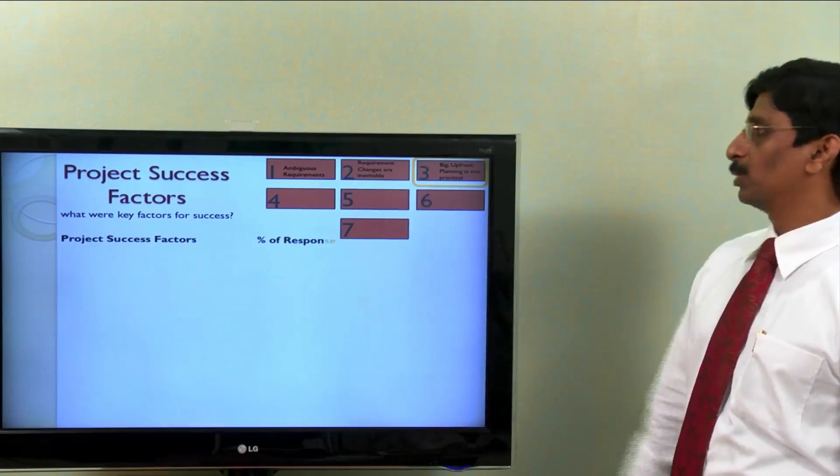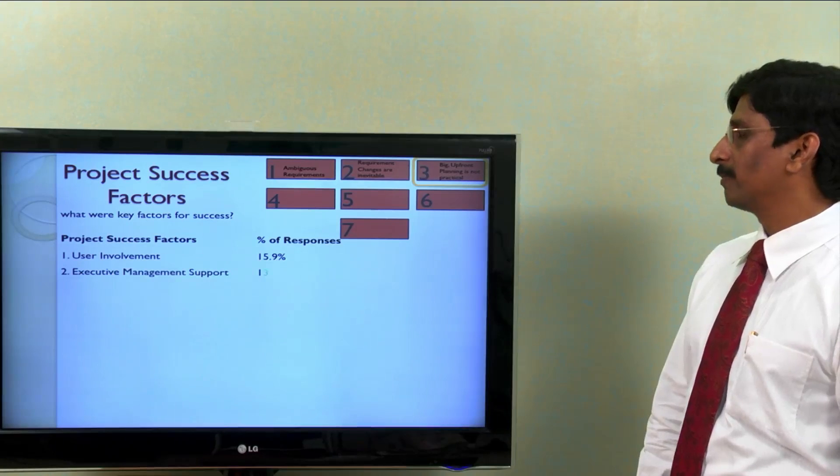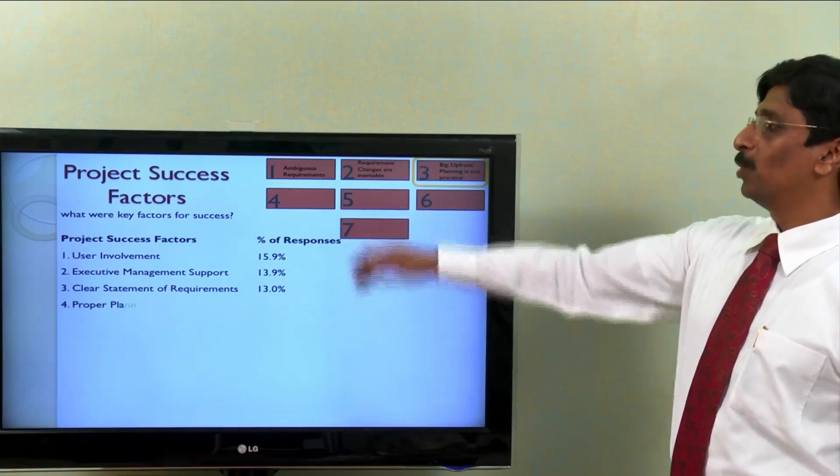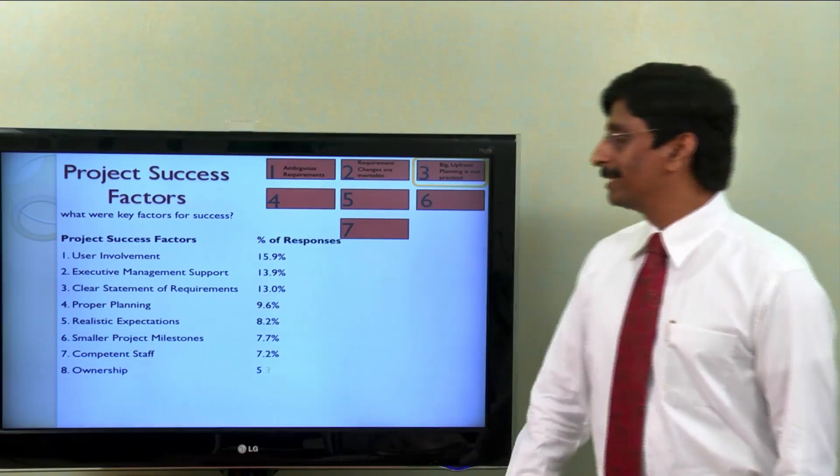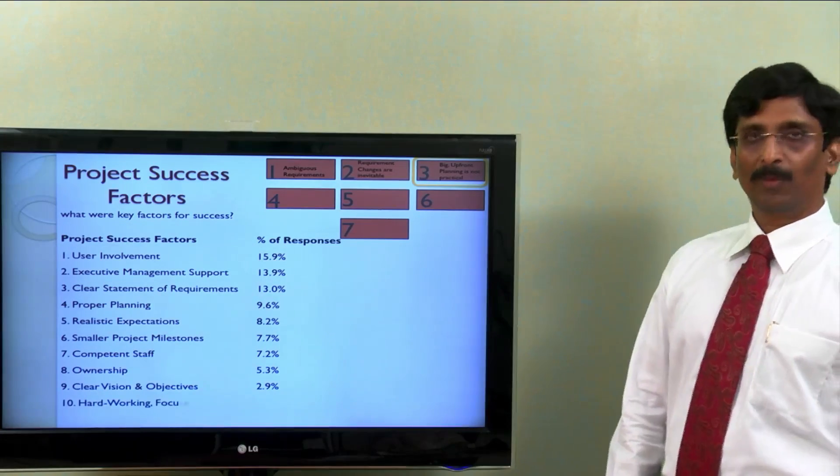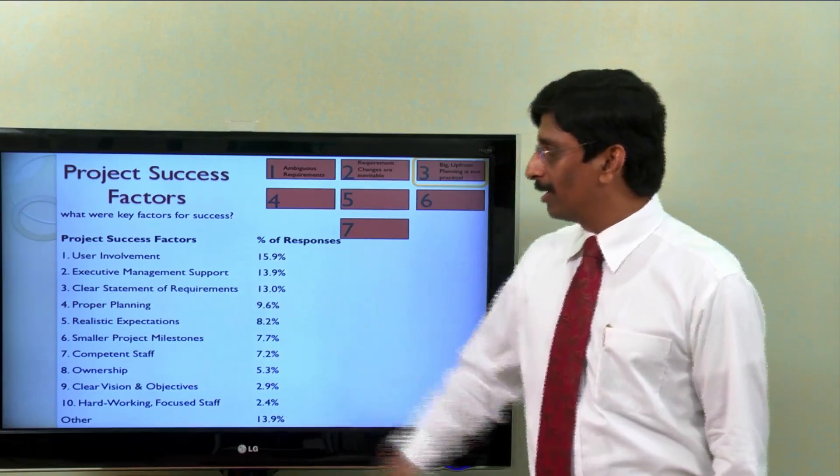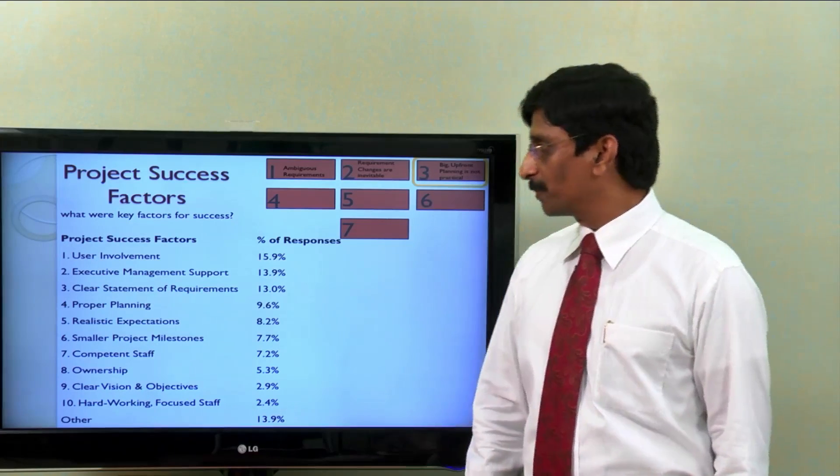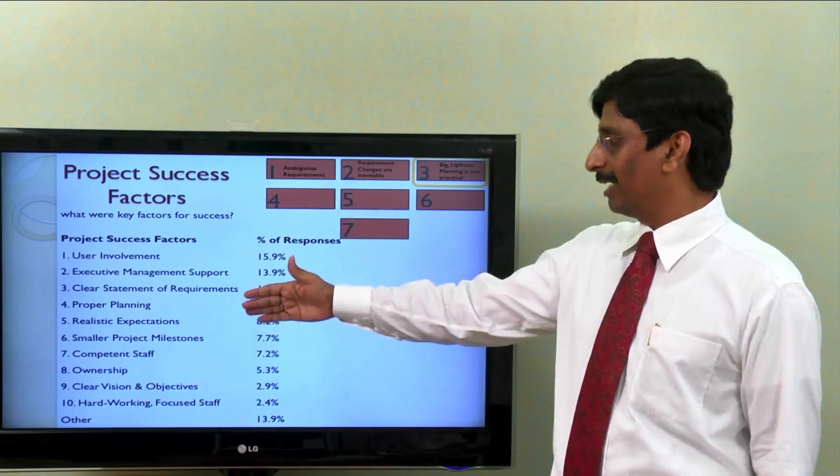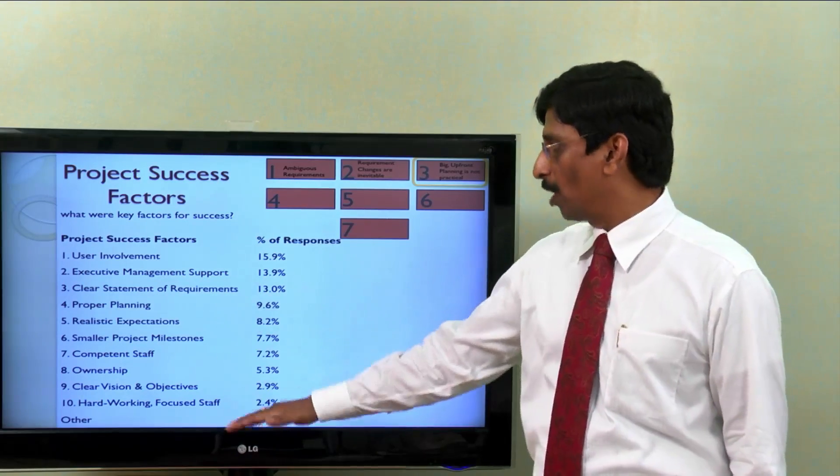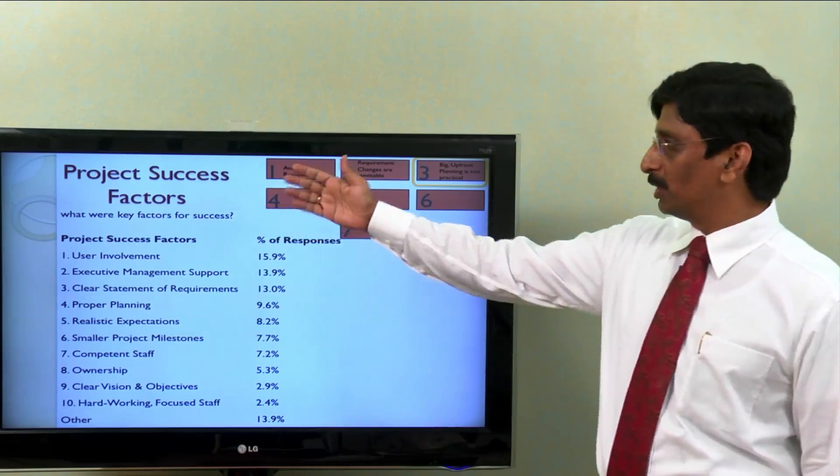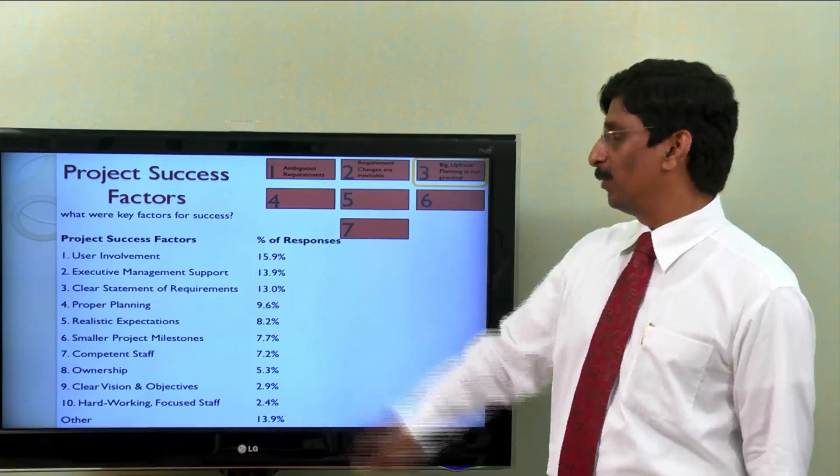As per Standish Group report, the first and foremost is user involvement throughout the life cycle. Second: executive management support. Third: clear statement of requirements. Planning comes slightly later, along with realistic expectations, and the list goes on. But the topmost one is user involvement and executive management support.